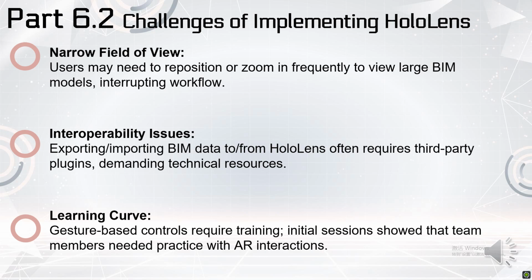About the challenges of implementing HoloLens, the first is the narrow field of view. Users may need to reposition or zoom in frequently to view large BIM models. The second is interoperability issues. Exporting and importing BIM data to and from HoloLens often requires third-party plugins. And the last is the learning curve. The gesture-based controls require training. Initial sessions show that team members need practice.